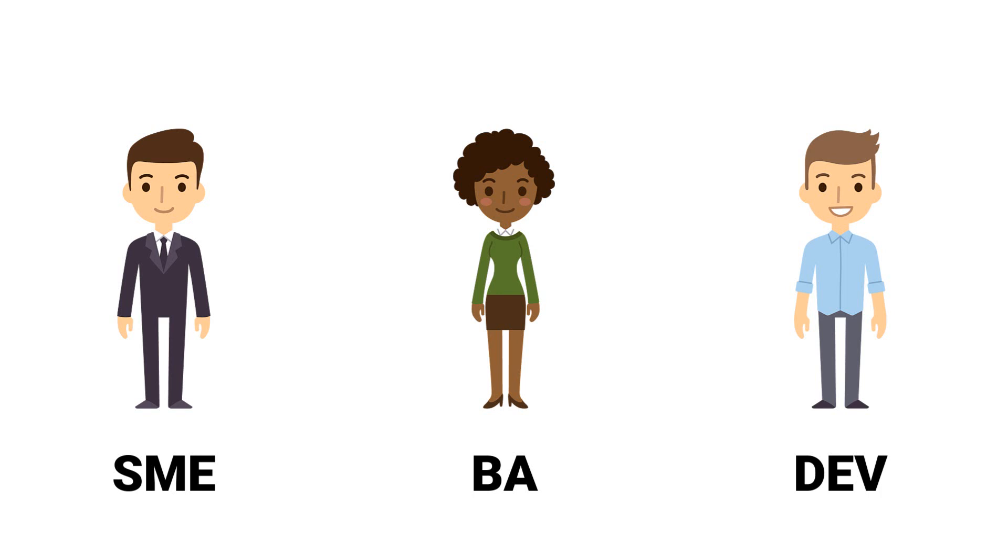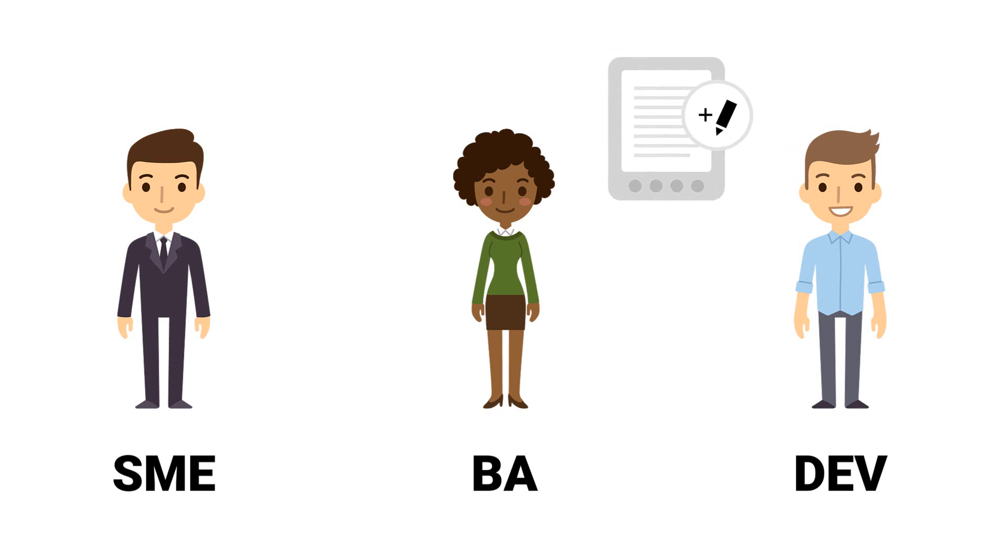Before the business analyst speaks to the developer, he creates documentation for the change, so that the developer can better assess it.